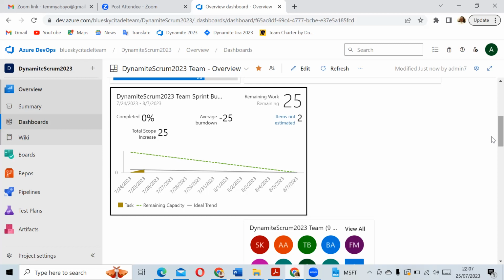Okay, so it might be something the QAs missed. So why they're taking it back to the QA is so that the QA now, if they check and find that, oh, this is true, is able to raise a bug for the developer to work on. That's why they take it to the QA and not to the developer, because the developer will be wondering, I've worked on this story, why is it coming back? But if they take it back to the QA, the QA checks if it's a defect, and raises a bug for the developer to fix it. All right. Thank you. Okay, you're welcome.